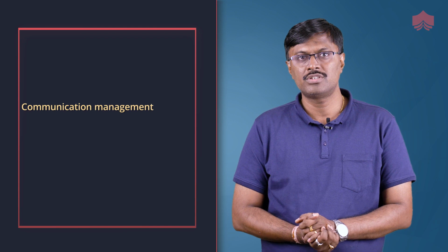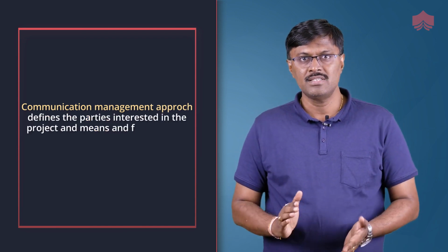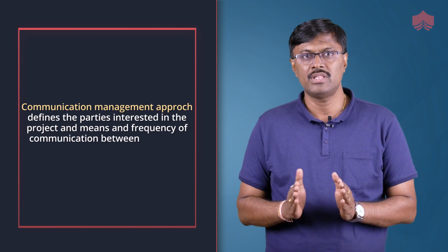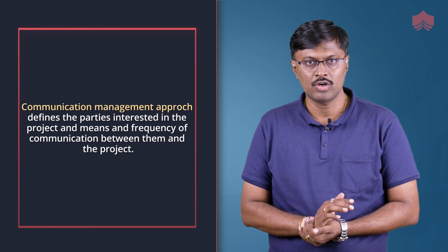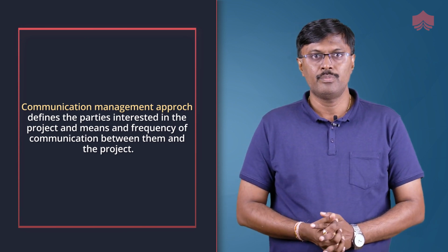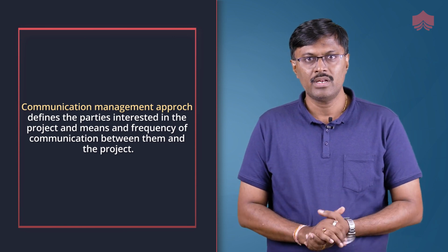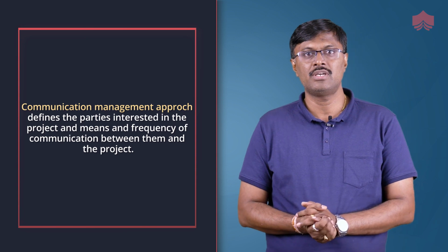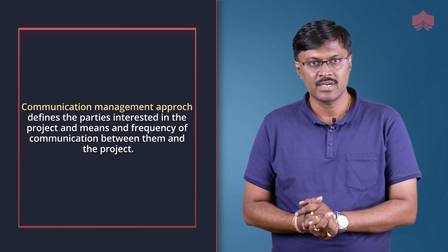Communication management approach defines the parties interested in the project and means and frequency of communication between them and the project. Where the project is subject to the commissioning organization's communication management policies, strategies, the PID should make reference to them rather than duplicating them. Where the project is not subject to the commissioning organization's communications management policies, strategies, appropriate strategies, approaches should be documented.